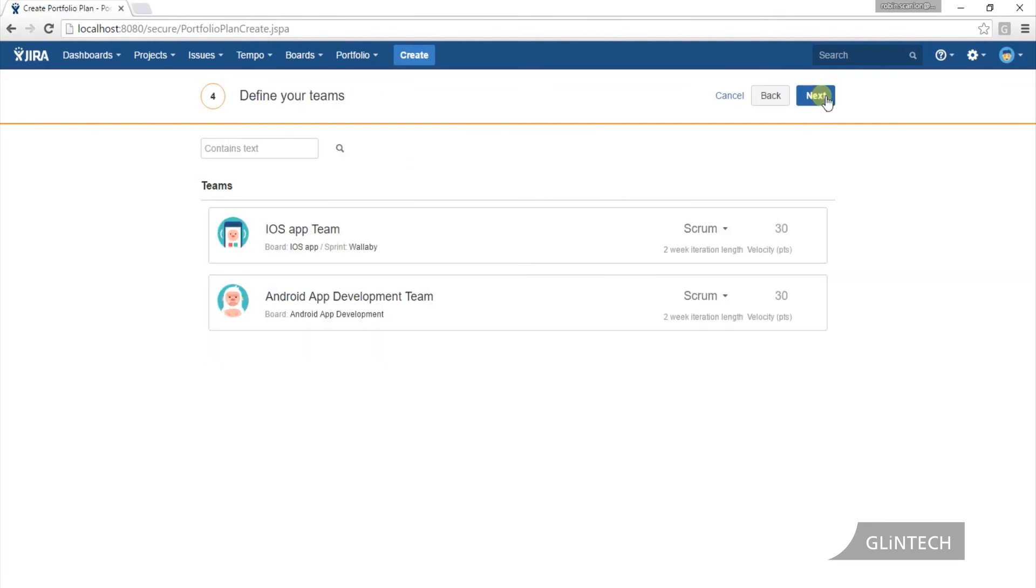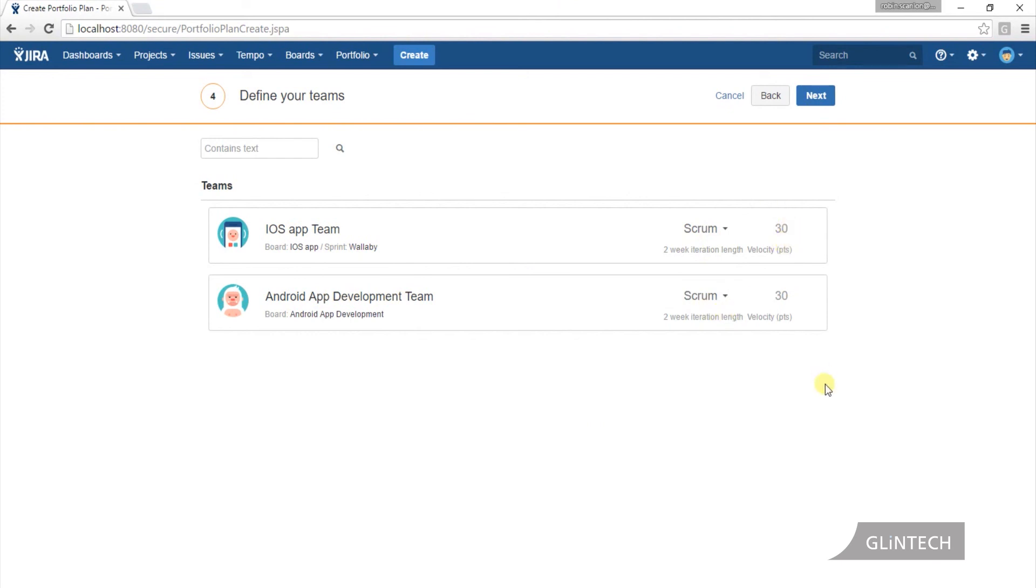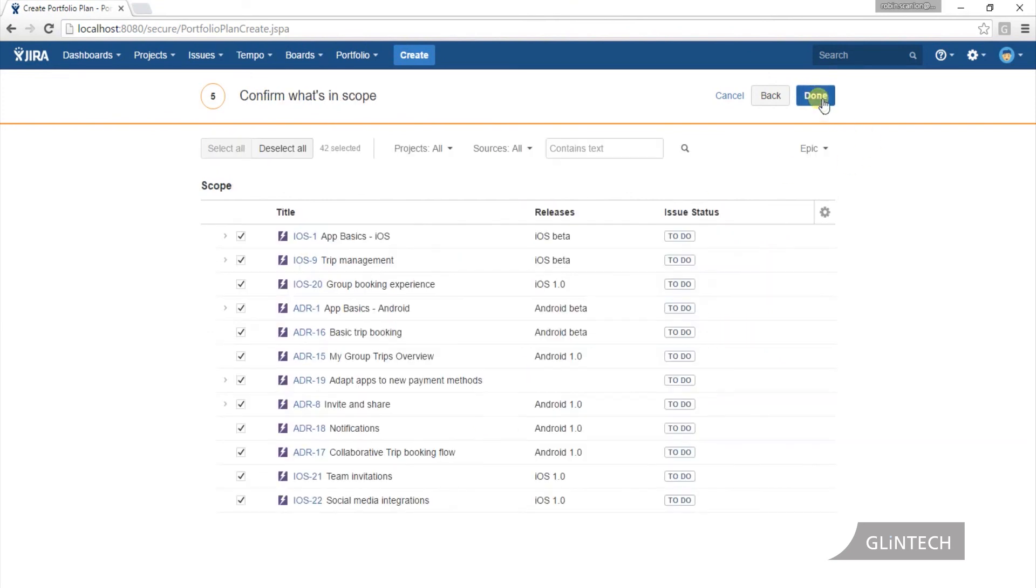And as you know, we've got tasks and time. We need some people to do the work. It automatically creates a team per board. We'll talk a bit more about this when we get in. Notice on my board what sprint they're on. It knows that they're working in Scrum and their average velocity for the team. We'll talk about that in a second as well. But it's ultimately created them for us. Easy.